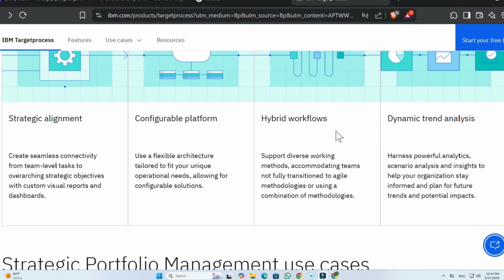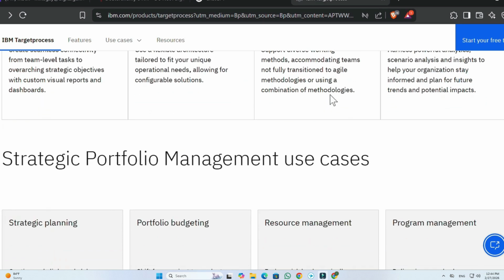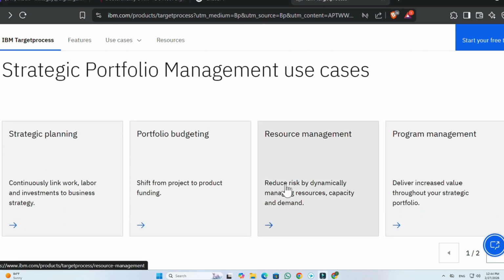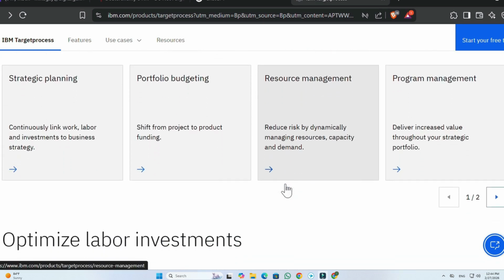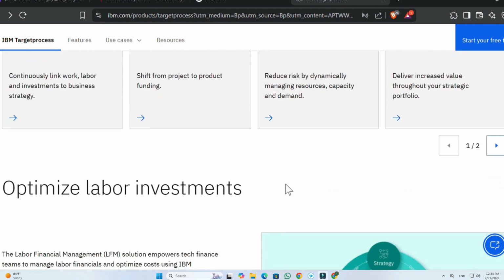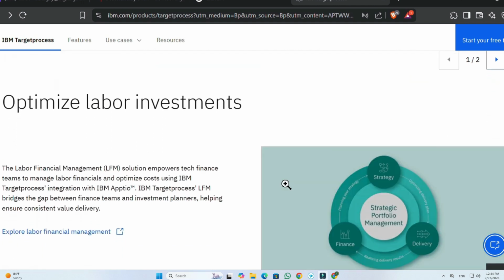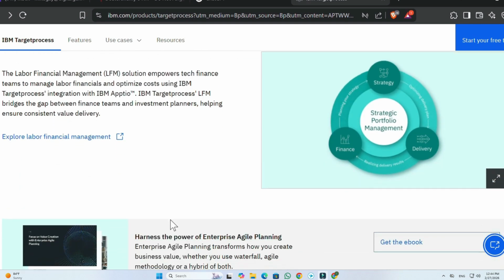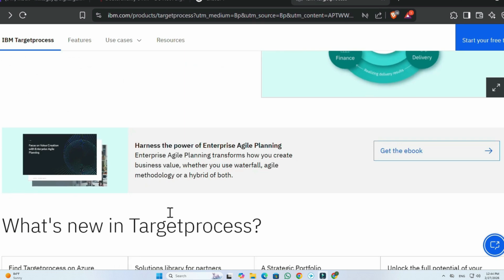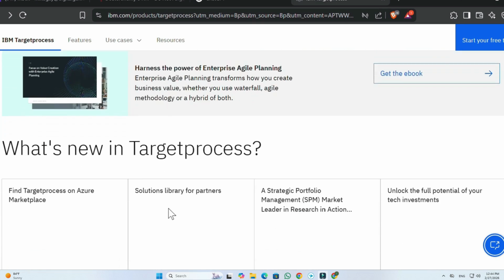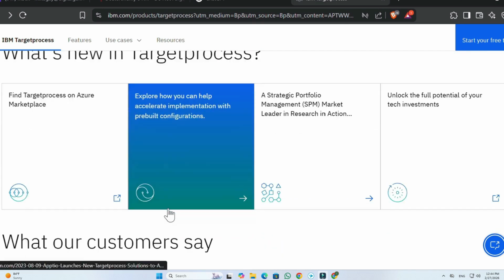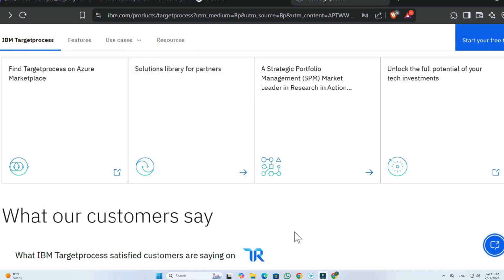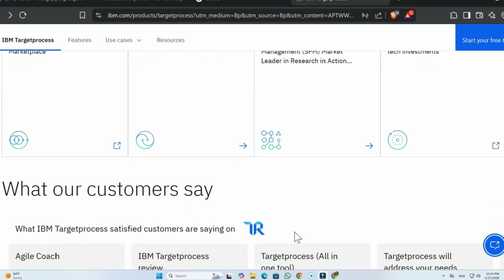Releases. A release is a collection of work items that are scheduled to be completed in a given time frame. To create a release, go to the Portfolio tab, then click on Releases. Click plus New Release. Fill out the release details such as name, start and end date, and target goals. Add work items to the release to ensure the team is aligned with the release objectives.